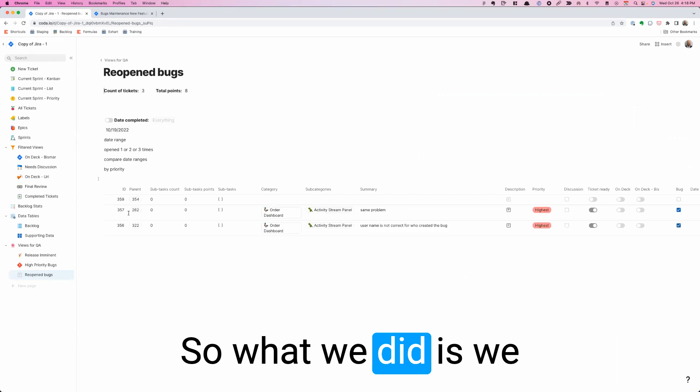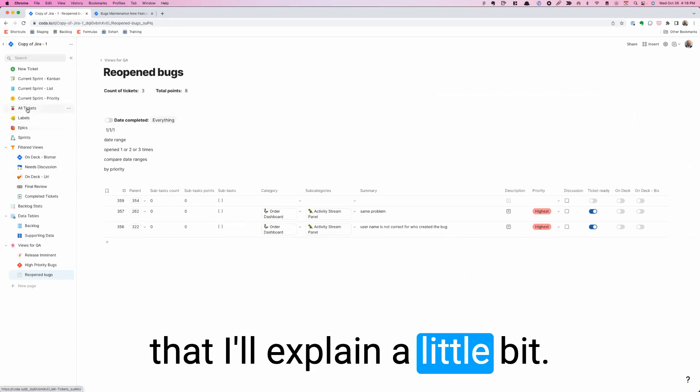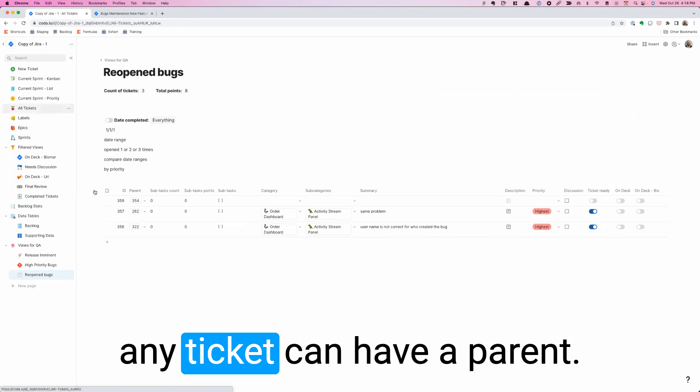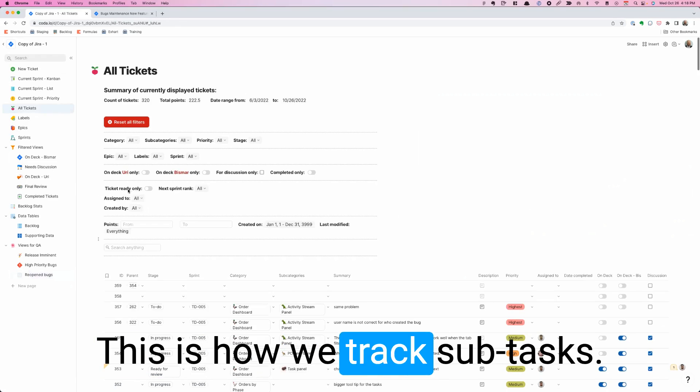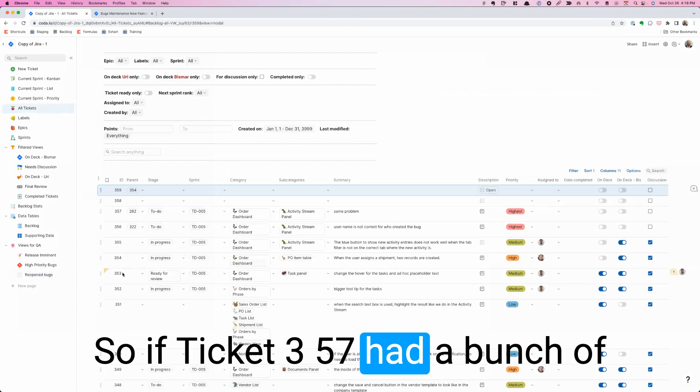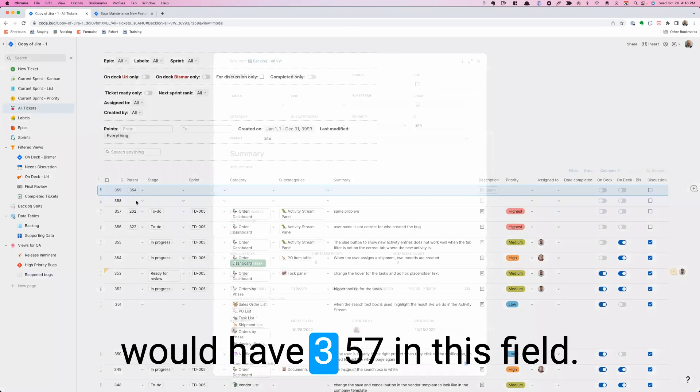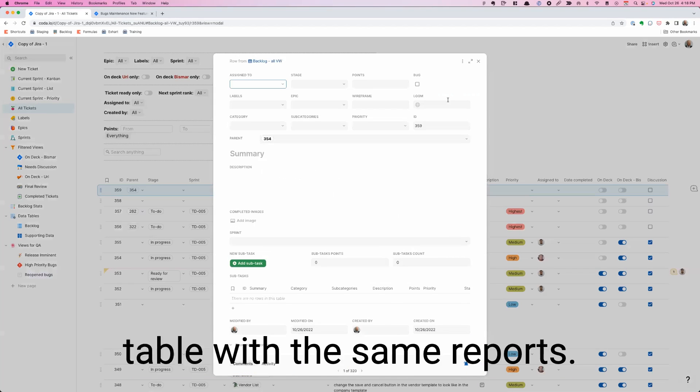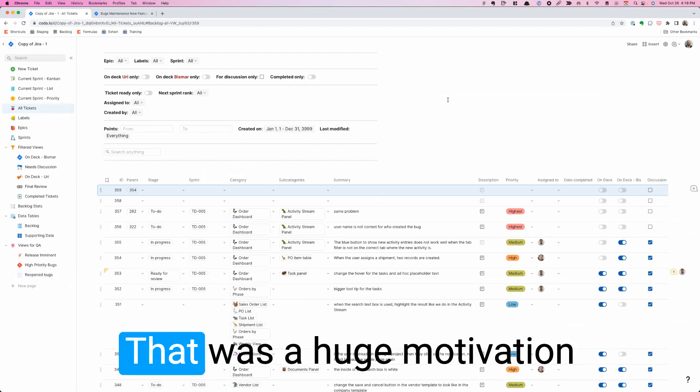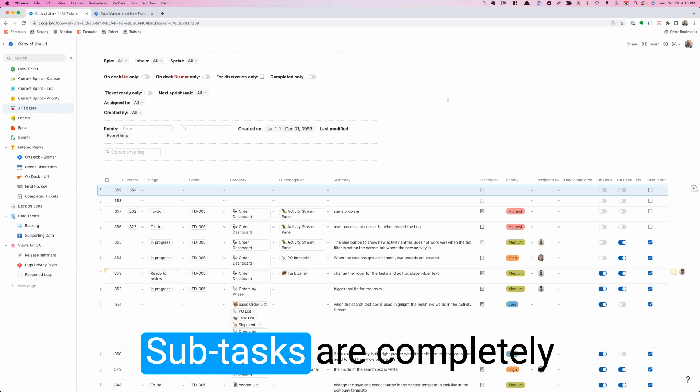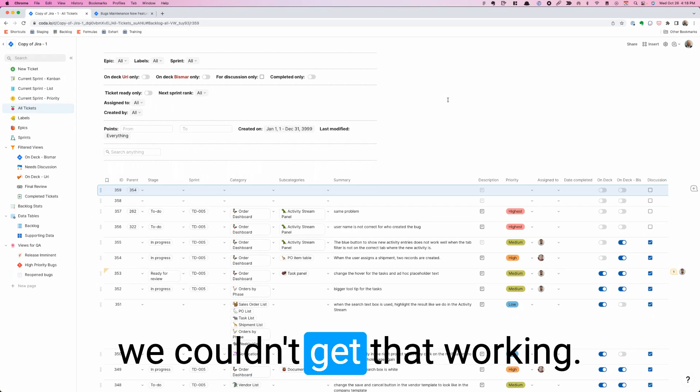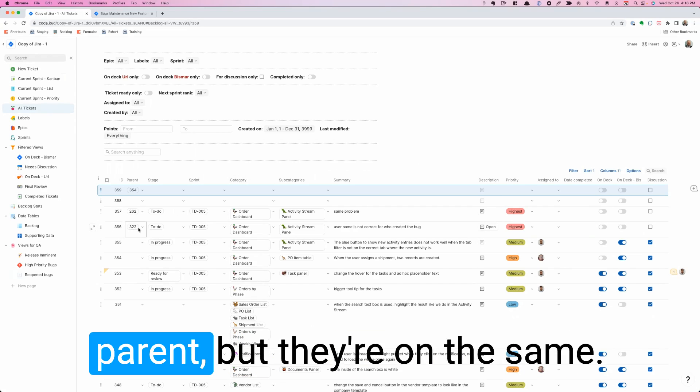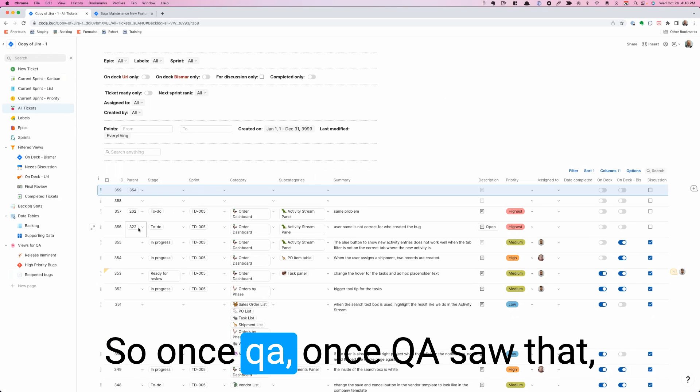What we did is we have this feature that I didn't mention before. When I go to all tickets, any ticket can have a parent. And this is how we track subtasks. So if ticket 357 had a bunch of subtasks, all those tickets would have 357 in this field. That works super well for us because that means they're all part of the same table with the same reports. By the way, Jira doesn't do that. That was a huge motivation to move off of that. Subtasks are completely different from tickets and we couldn't get that working. So here, the only difference is that some tickets have a parent but they're on the same table.